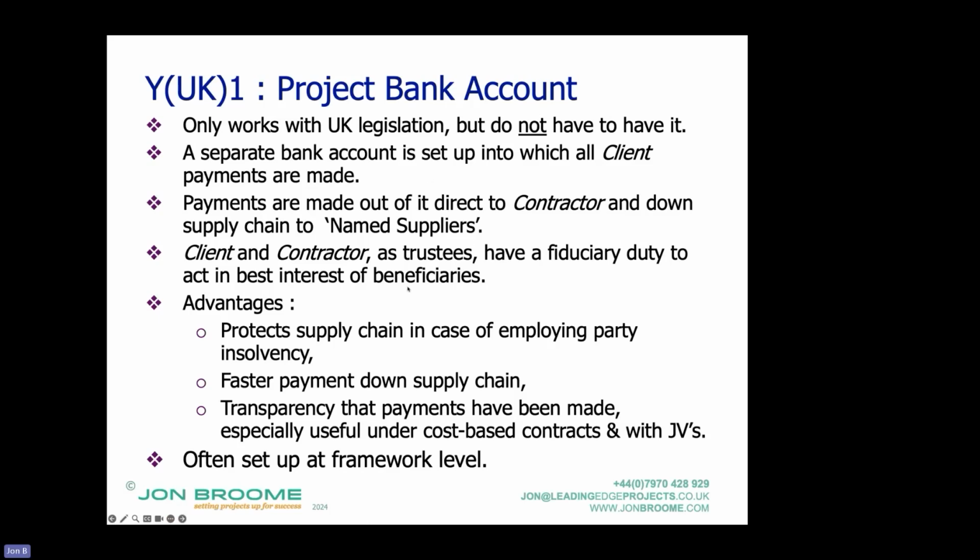Last comment on this, this makes the project bank account a trust fund. I know of big projects where a project bank account has been set up with a JV on a cost-based contract, because it just makes it easier to account for the money, follow the money, and so on. So you don't need to have trustees. You'd have to cross out words in UK 1, but you could just have a project bank account without the trustees.